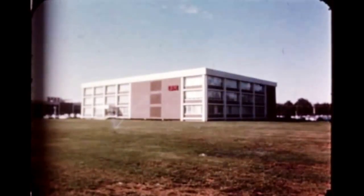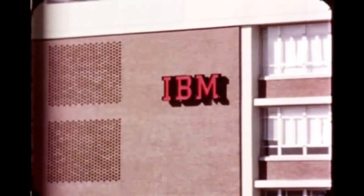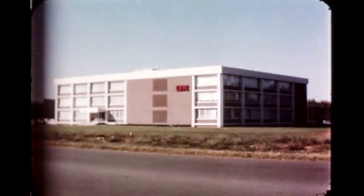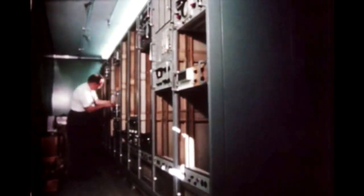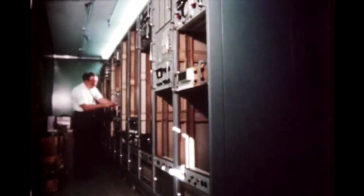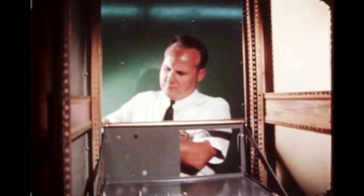Negotiations of the Saturn IIB instrument unit mission contract is continuing with International Business Machines. IBM personnel are currently at work in the Huntsville facility. One of the activities in which IBM is participating is preparation for the Flight Systems Test Program, a thermal vacuum test of the entire IU under simulated spaceflight conditions to be performed in an environmental chamber at Douglas Aircraft's Huntington Beach facility. To reduce costly duplication of testing facilities, special test equipment, which will be required both at Huntsville and Huntington Beach, is being installed in trailers which can be air transported between these locations.